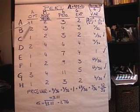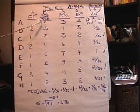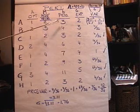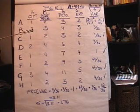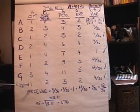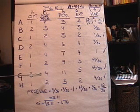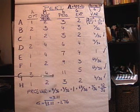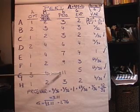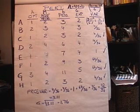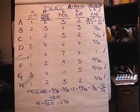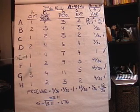So let's say that they say, well, optimistically we'll finish this activity A in one day. Most probable is two days, pessimistically three days. And we get the same information for every activity. Notice on this one, activity G, optimistically it's three, most probable is four, but there's quite a stretch there, pessimistically it's eleven days. So there's some uncertainty then in terms of how much time it's going to take to complete these activities. And if you've got some people with experience, they should be able to tell you pretty accurately their judgments on these ranges.